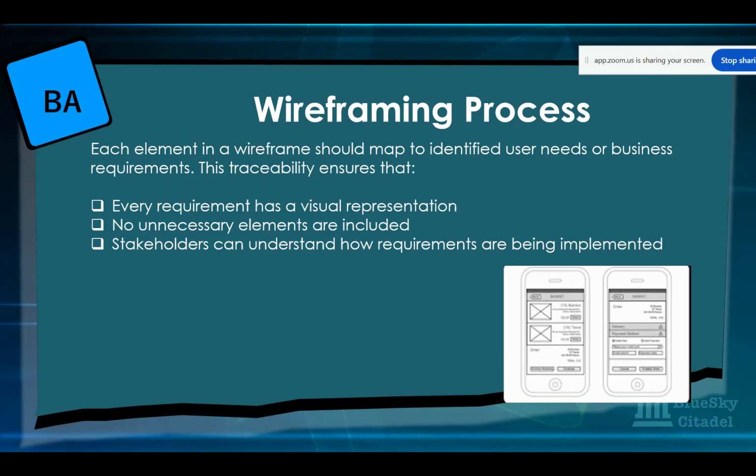And if it has been committed to sprint, you can say, okay, can we commit it to sprint right now? I will make sure that in the next minutes or hour or day, I'll quickly do the wireframe and attach it. So that's sometimes the B is if for any reason you're not able to attach your wireframe and you're in sprint planning and you want to commit the story, you can commit to the team to say, guys, I'm really sorry, the wireframe is not included. I'll scramble really quickly, get it done and attach it.